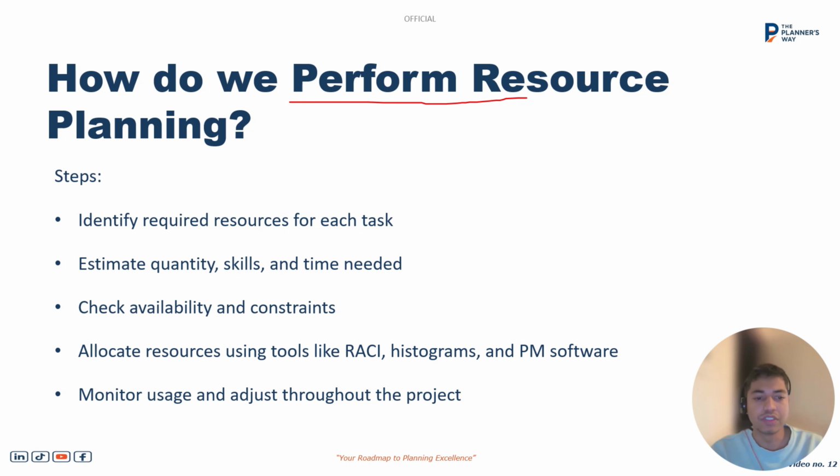And the third one we need to take care of is the availability and the constraints. That means how many days the resource is working. If the schedule is following a 5-day working calendar, what's the working calendar for that resource and how does it impact the schedule? We need to do that analysis as well while doing resource planning, with something we call bucket planning. The next step is the resource analysis, looking at the resource chart that we use, some histograms.